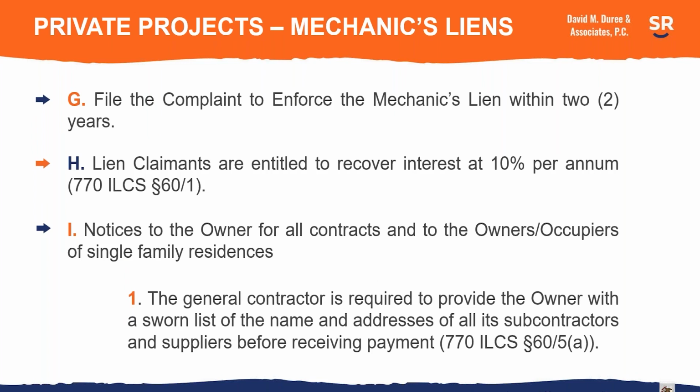As indicated, subject to that exception, if the owner files a notice, you have 2 years to file your lawsuit to enforce the mechanic's lien, and you are entitled to recover interest at the rate of 10% per annum under the statute.